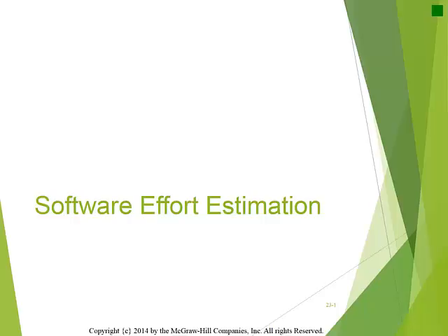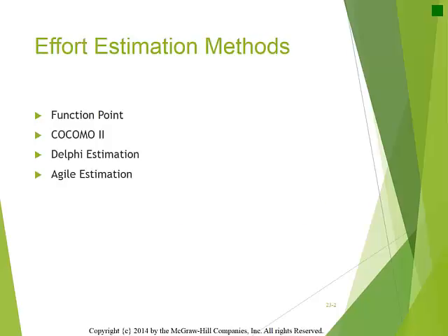This lecture covers software effort estimation. The largest expenditure for a software development project is for the salaries of the development staff. Effort estimation involves approximating the level of effort needed for a project in terms of person weeks, person months, or hours. When person months are used, the average monthly salary of a software engineer multiplied by the estimated person months is the dollar amount the project costs.